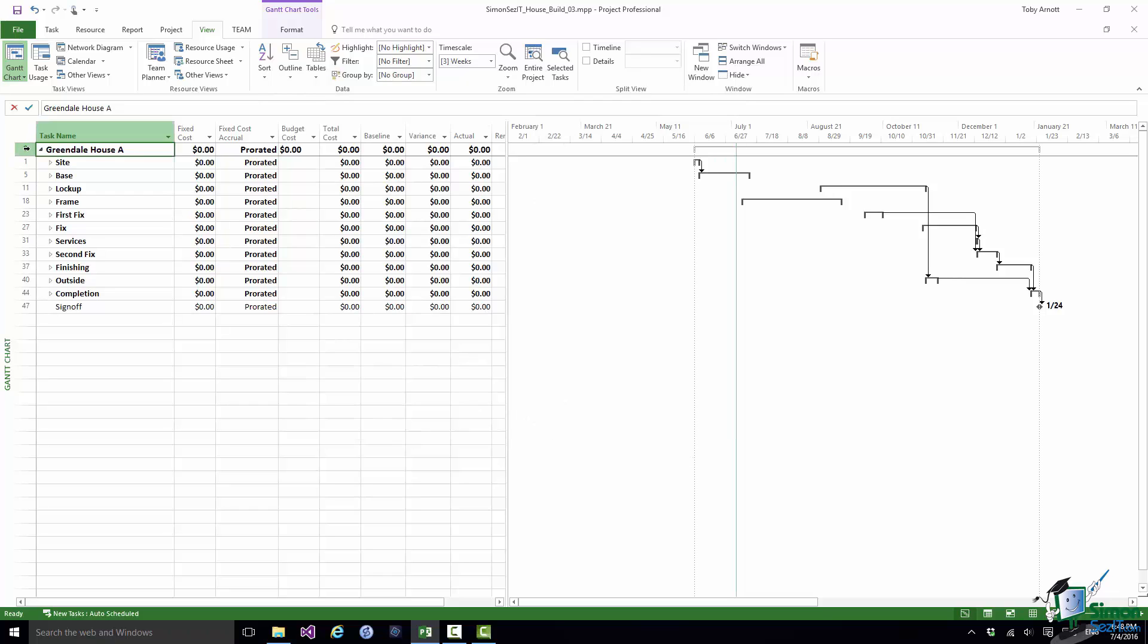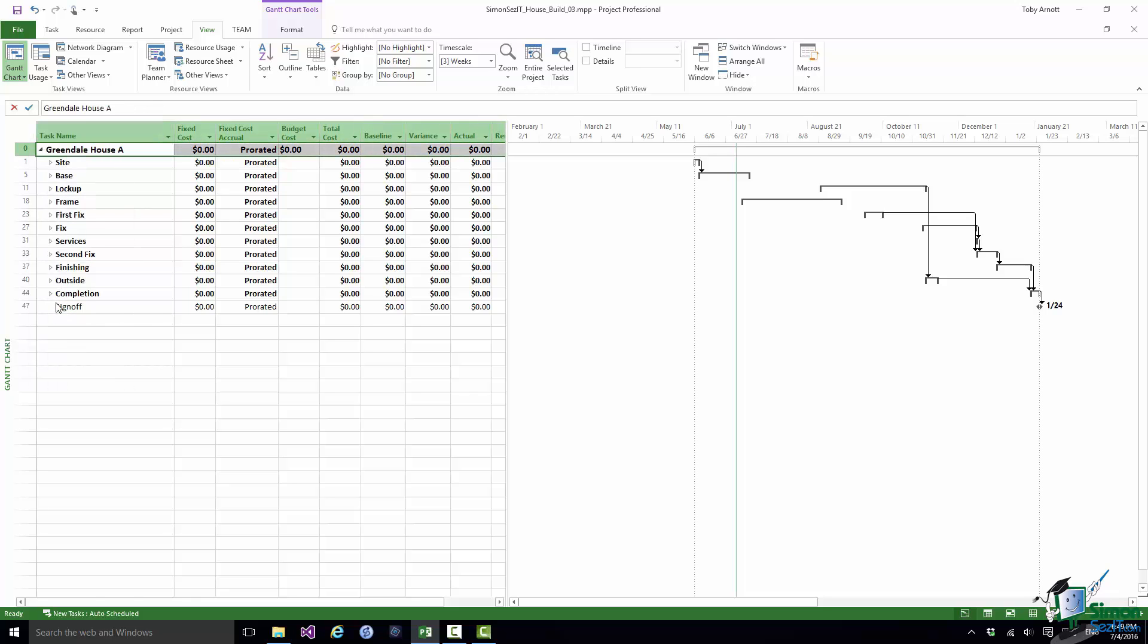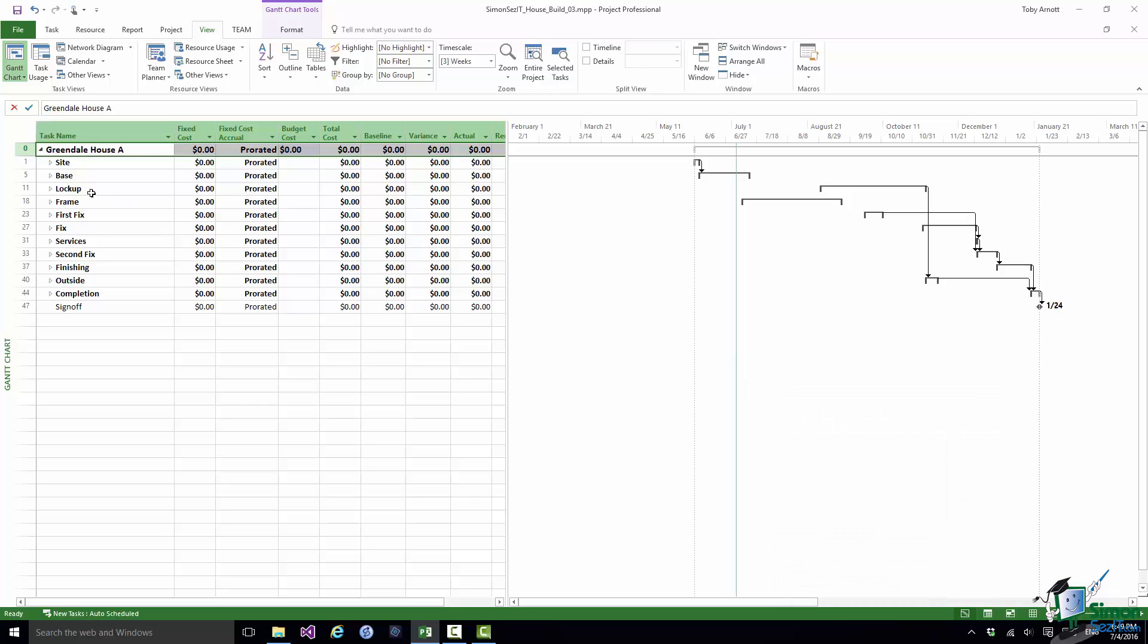Now what I'm going to do is to assign the resource to the task. When I assign a budget cost it must be assigned to the project summary task. You can only assign it to the whole project and you do that by assigning it to the project summary task. You can't specify the units, you can't specify the cost, you can only assign it. However, once you have assigned it you can then specify the cost in one of a number of ways.